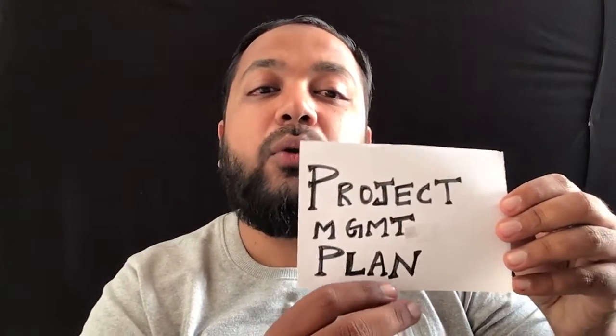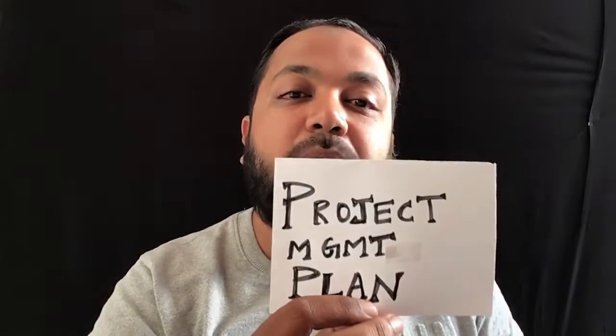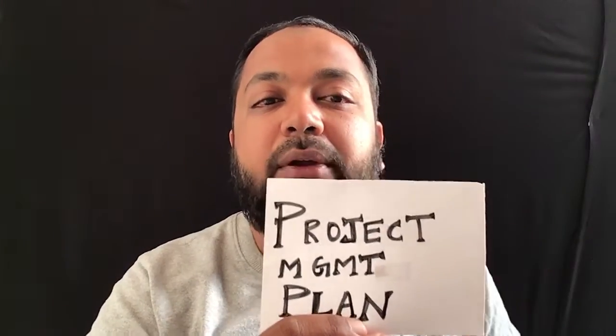Now if you want to change the project management plan, remember this, let's say there was a delay of a month, you did not get some access which you were supposed to get. In that scenario you will have to raise a change request and then you can go and change the project management plan. Please remember, the project baseline, performance baseline, that is the scope baseline, cost baseline, and the schedule baseline, can be changed only with the change request. You just can't go and directly change these things.